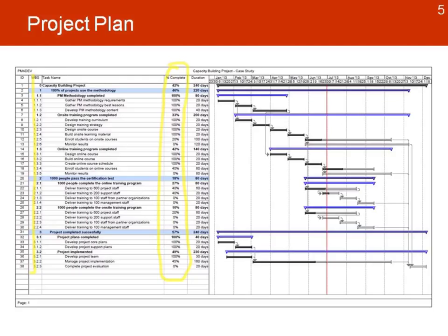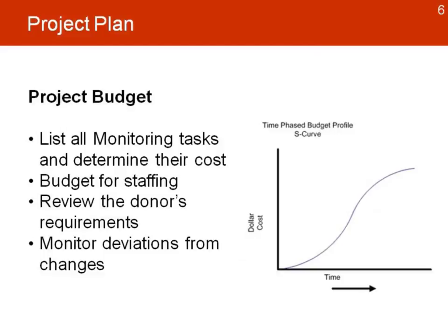We can also use the Gantt chart capabilities where we identify the activities with bars that can help us also identify where we are in terms of the project progress if we want to compare it with a line which will be today's date, and we want to see where we're having problems with certain activities that are lagging behind. That is an opportunity for the project manager to look at the schedule, to see what is happening, and to make the corrective actions as needed.